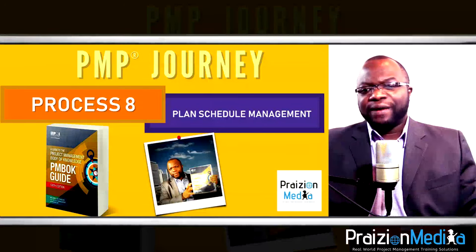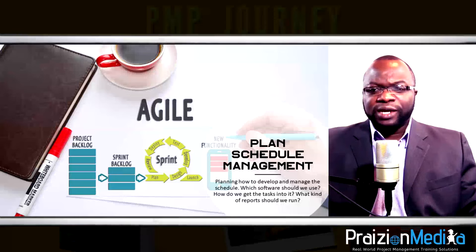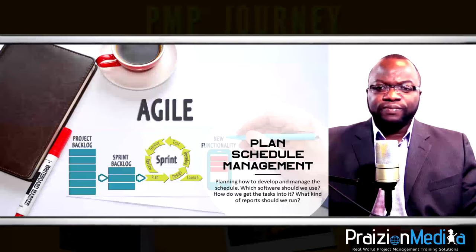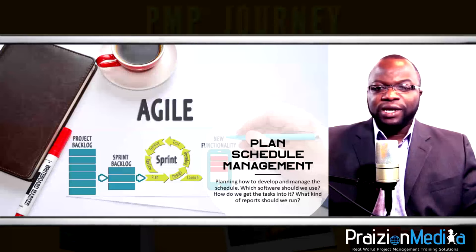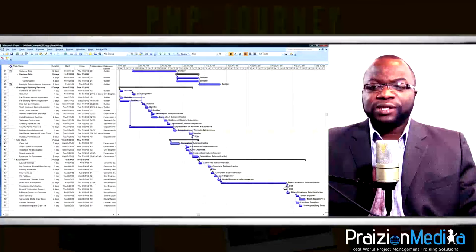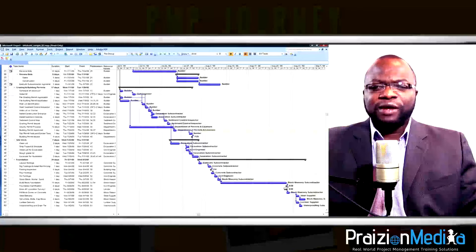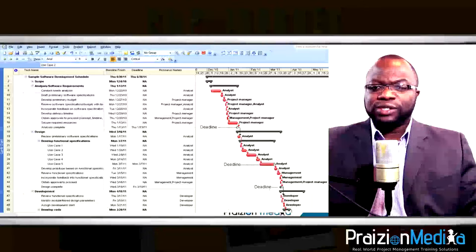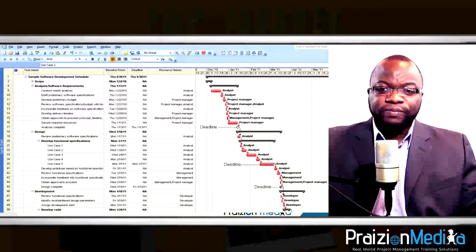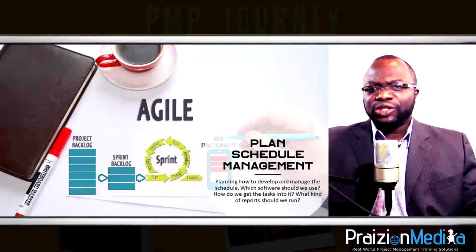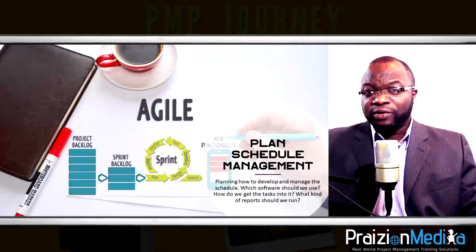Process 8: Plan schedule management. This is where we put together a plan for how to manage the schedule — how to define activities, sequence them, estimate durations, and put the whole schedule together. In the world of PMI, we need to be intentional about the how: will activities be defined with team effort, which relationships will we use, which tolerances do we need to be aware of?